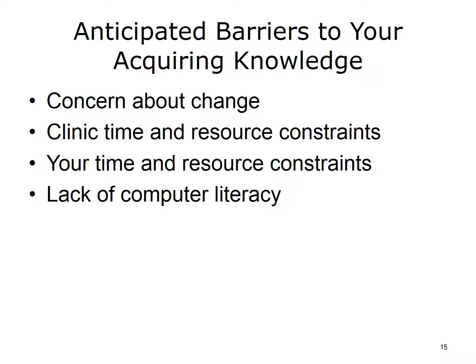Analyst resource constraints are also a barrier. Either the clinic is paying for your services, or your employer is funded by the government to provide services, or some combination of both. Either way, there will be more processes to acquire knowledge about and analyze than you have time for. To overcome this, work with the clinic to prioritize the processes that are analyzed in the allotted time.